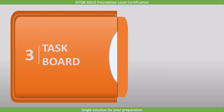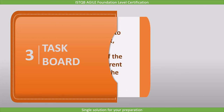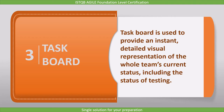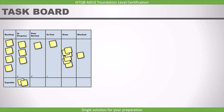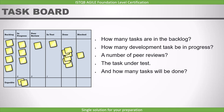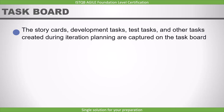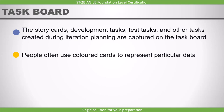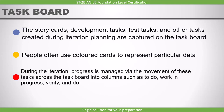The last communication method is the task board. A task board is used to provide an instant detailed visual representation of the whole team's current status, including the status of testing. This example of a task board shows the status of all tasks at once: how many tasks are in the backlog, how many development tasks are in progress, the number of peer reviews, tasks under test, and how many tasks are done. Story cards, development tasks, test tasks, and other tasks created during iteration planning are captured on the task board. People often use colored cards to represent particular data. During the iteration, progress is managed via the movement of these tasks across columns such as to do, work in progress, verify, and done.